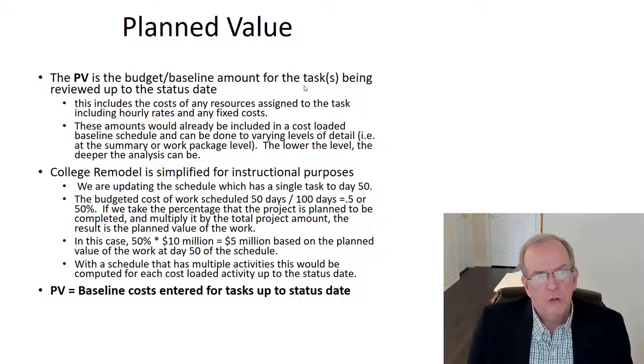So the plan value includes the costs of any resources assigned to the task, including hourly rate and any fixed cost. These amounts would already be included in a cost-loaded baseline and can be done to varying levels of detail. The lower the level, the deeper the analysis can be, for sure.